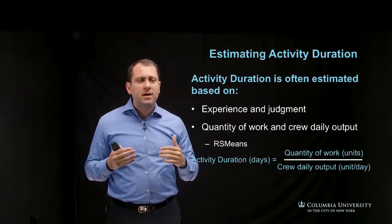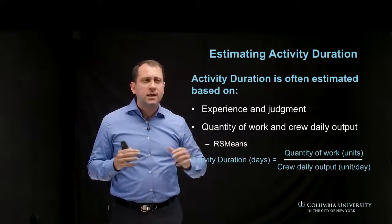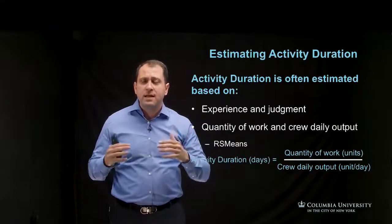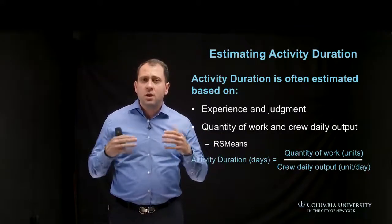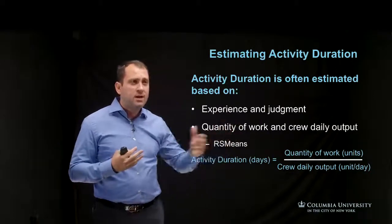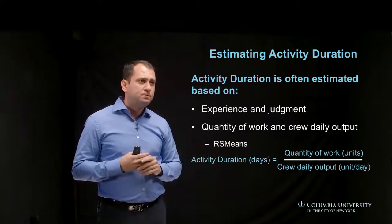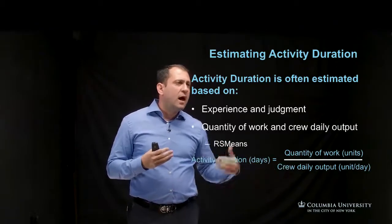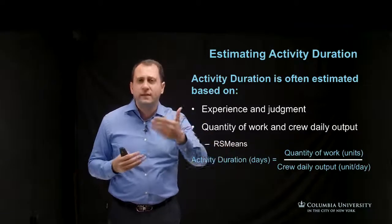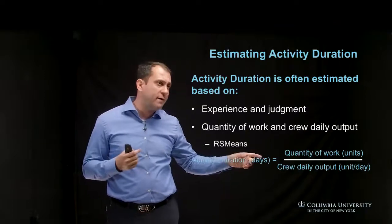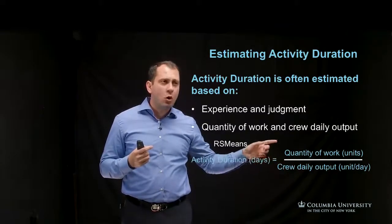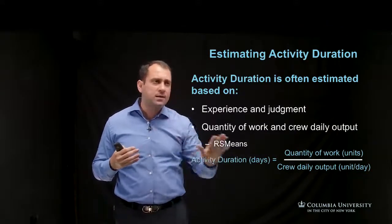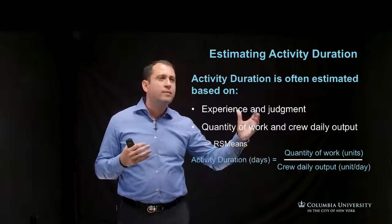Here in North America, we use RS Means a lot for such tasks. RS Means is North America's leading supplier of construction cost information, which also helps with duration estimations. It provides information such as the daily output for a specific crew performing a specific construction activity. Knowing this daily output and the quantity of work to be performed, the activity duration in days can be determined.